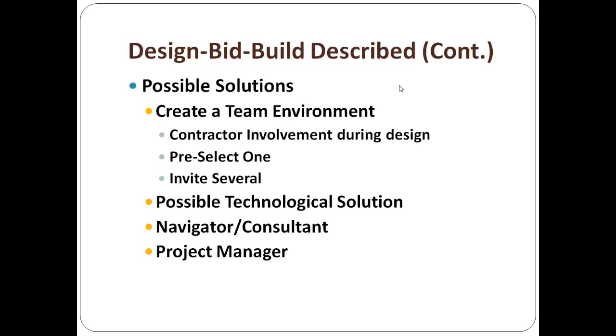I've seen this done by one of my preacher friends who had a good-sized project. It was a $3.5–4 million project, and he talked one of his general contractors in his church into giving up his salary for the year in his business. He came on and served his church, and yes, he took less money, I think half, but nonetheless, he was willing to do it to help his church. He held the builder and the architect accountable to make certain that the builder used the materials and equipment that was specified in the contract, in the bidding process, in the specs, and they got the building that they were supposed to get, because he held the builder's feet to the fire, so to speak. And I think they paid the guy $75,000 for the 12 months, and he saved the church around $600,000.